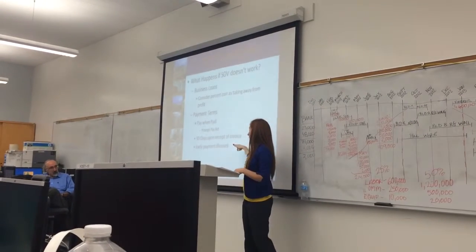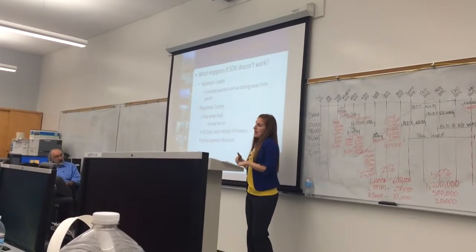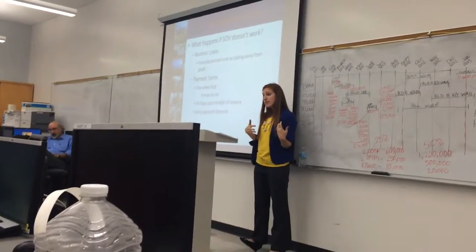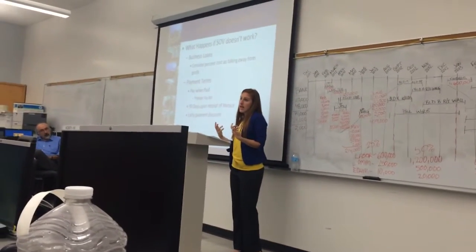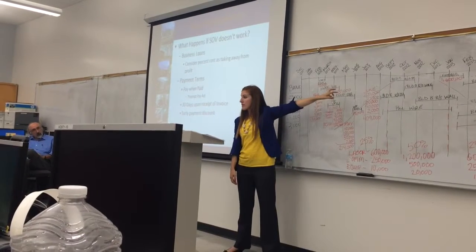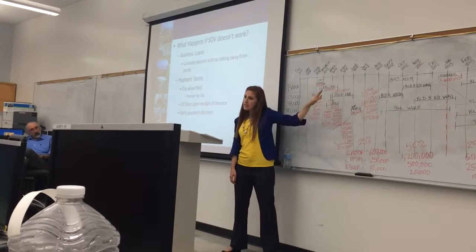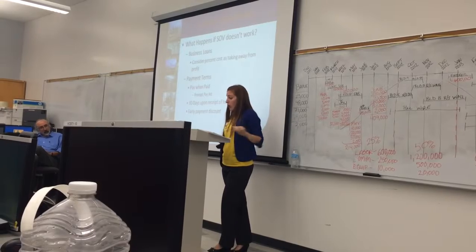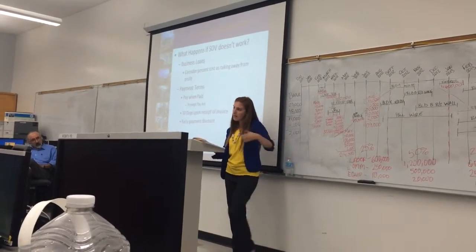On the flip side of that, you can get early payment discounts from vendors. You can negotiate that in. So we have negotiated with some vendors, if we pay them within 7 days, then they'll give us a 10, 15, 20% discount, whatever it is. And that helps with our cash flow, because instead of paying $200,000, all of a sudden we're paying $180,000. All of a sudden we're paying $190,000. It just adds that little bit of cushion into your bank for when you get those change orders. And then if you are able to manage all that, it adds to your bottom line.